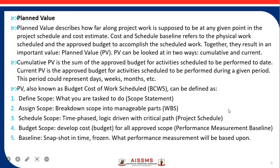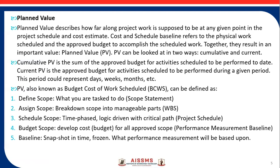The budgeted cost of work scheduled defines the scope — what you are tasked to do, that is the scope statement. Assign the scope — break down the scope into manageable parts, that is the WBS. Then schedule the scope — time-phased logic driven with critical path — the project schedule. Develop the cost for all the approved scope. And finally the baseline, which is the snapshot in time which is frozen — that is the performance measurement baseline. So that is planned value, also called the budgeted cost of work scheduled, or BCWS.